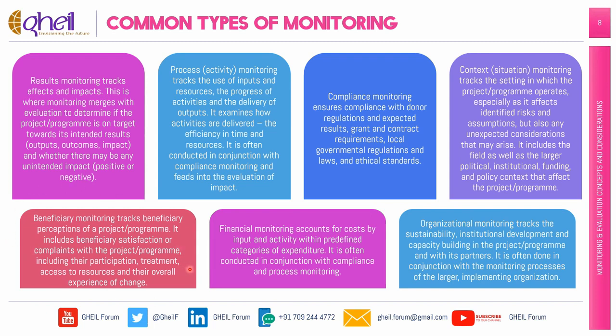Beneficiary monitoring tracks beneficiary perceptions of a project program. It includes beneficiary satisfaction or complaints with the project program, including their participation, treatment, access to resources, and their overall experience of change. Sometimes referred to as beneficiary contact monitoring, it often includes a stakeholder complaints and feedback mechanism. It should take account of different population groups, as well as the perceptions of indirect beneficiaries, for example, community members not directly receiving a good or service.